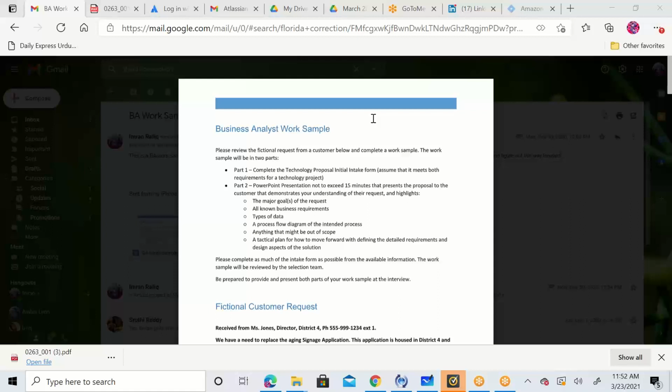If it is FRD, then again same thing: executive summary, introduction, scope, in scope, out of scope, risk, assumptions, dependencies, and constraints, architecture diagram. That is the only addition. Process flow or architecture diagram or use cases or UMLs, whatever process flow you're using, simply mention that, and then directly go to detailed functional requirements, non-functional requirements, and then appendix section, reviewer, sign-off, approval. Same way you have user stories, same way this has a template as well.